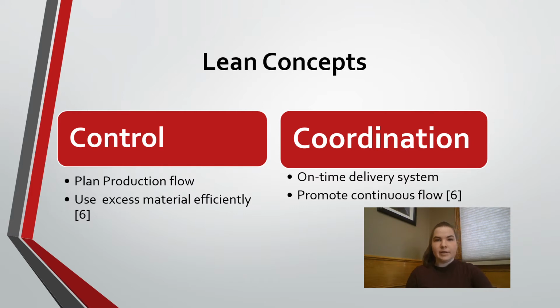By using lean principles, we can reduce the waste due to excess inventory. Planning the production flow of inventory through control helps by monitoring the production of materials to assure that enough material will be present on time and no sooner with limited excess. Sometimes excess material can be used in other projects. However, if materials get delivered too soon or need to be taken away, it takes up space and costs money.